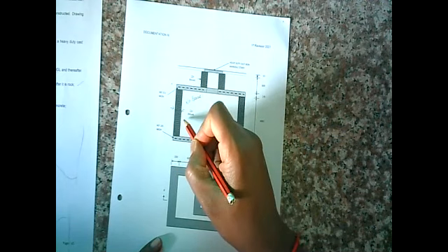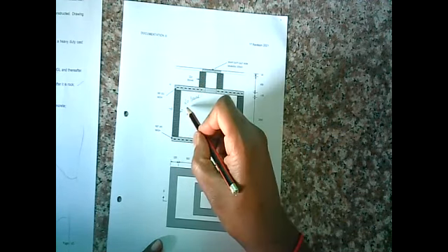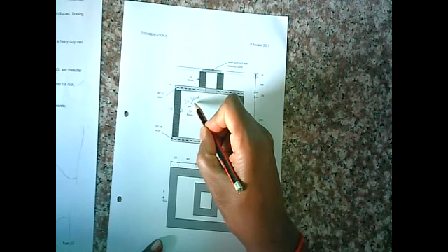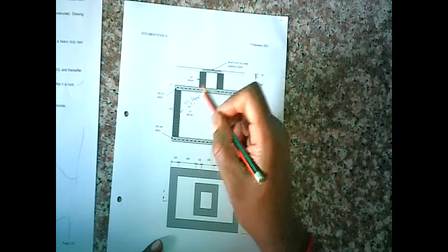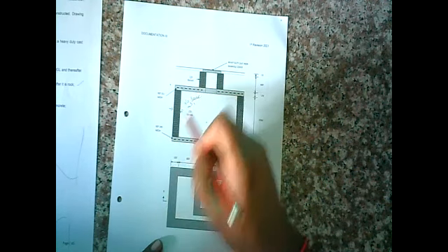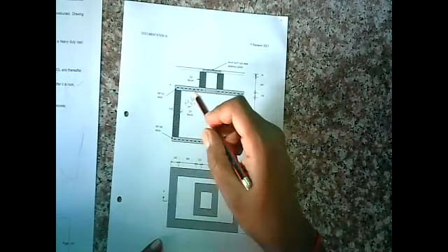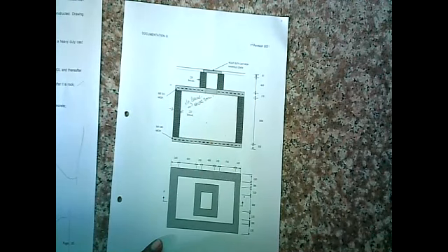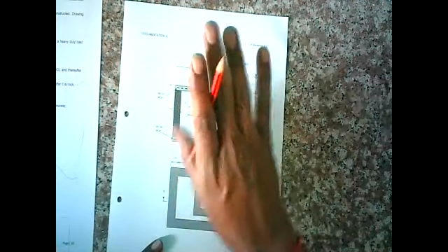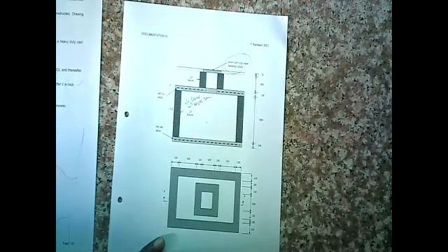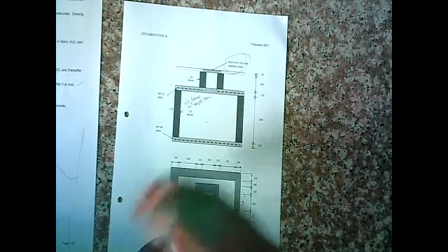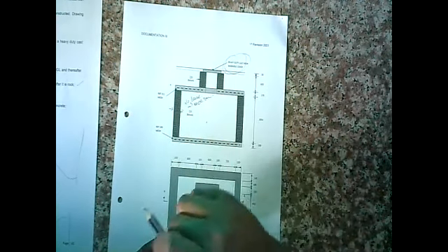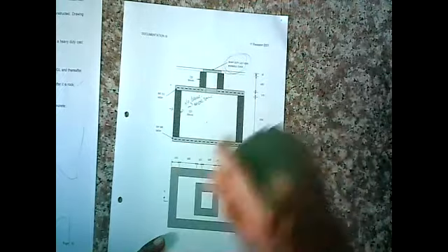And if I know the area and the thickness of the brickwork, then I can also quantify meter cube of mortar, your building material or your plaster and building sand, all that. So you can quantify mortar. Also, one more thing: heavy duty cast iron manhole cover. Believe it or not, that's also part of the quantities. I'll show you how to handle that in your bill of quantities. So let's look at this.